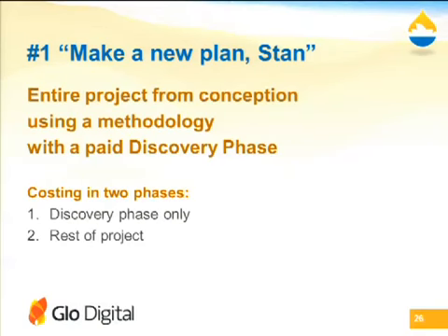So the advantage is that we know what the project's about, and then we cost it in two phases. The first phase being we charge or quote the client for the discovery phase only. Once they're happy with that, we understand what the project is about, it's much easier to quote the rest of the project, of course. It's just common sense, really. Okay, so will the client pay for a discovery phase?